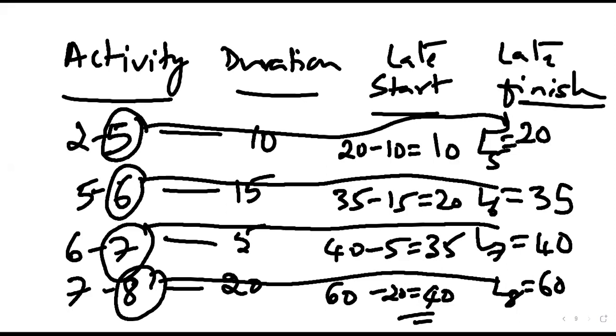Usually these types of numericals are converted into a graph. In the bar graph, the early start, early finish, latest start, and latest finish can be easily indicated. Possibly that will be the project work for all the students. They are supposed to calculate the early start, early finish, latest start and latest finish for each of the activities. Once that is calculated, you have to convert all those numbers into the graph, and then give the interpretation.